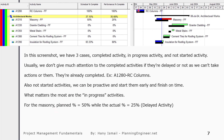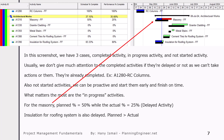For the masonry, the planned percentage is 50% while the actual is 25%, so this is obviously a delayed activity. Insulation of roof system is also delayed. Why? Because the planned is more than the actual. Although it is forecasting and maybe a little bit delayed, the concept is that the planned is more than the actual — it means it is delayed.